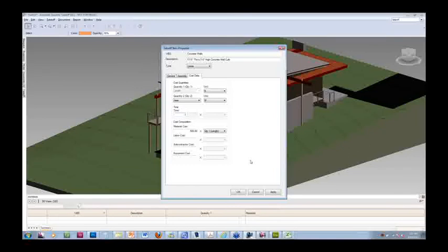And some people, in the end, if they have an estimating program like Sage Timberline, for instance, which is pretty common, they may not even have to do this and simply use the catalog to map the objects to that assembly. And this assembly already has the data in the estimating program. So all you need pretty much is the mapping.